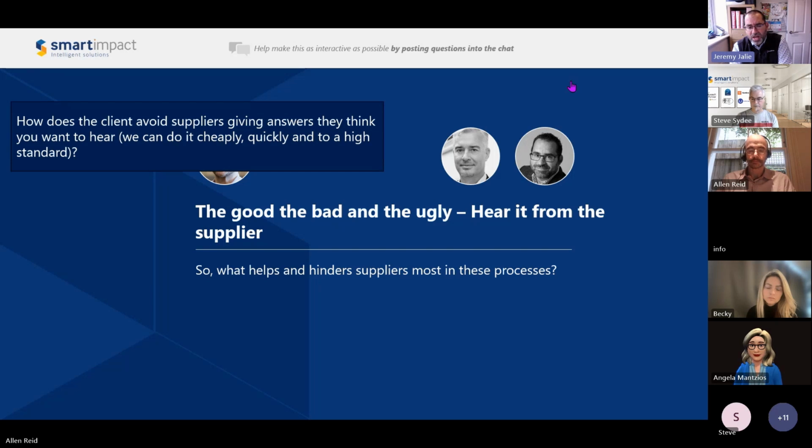Great, thank you. And I guess one of the main points there, exactly as you say, is if a supplier is in the habit of putting their prices up after the project has been sold, you won't be the first time they've done that. So the key thing is asking their existing clients, how much did they start off with in the budget and how much did they end up with? And did you end up with a whole series of horrible revelations through the project? That's probably one of your best safety nets there.